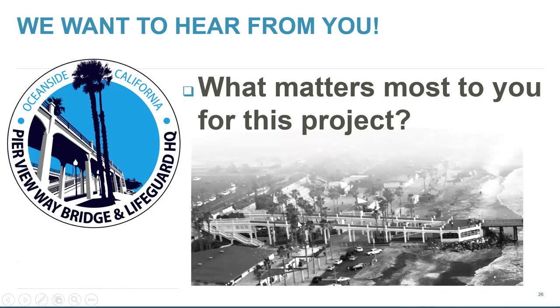So that's why this project is moving forward, not only because it has more of a sense of urgency because of its condition, but also because some of the columns and foundations that are going into the structure could be significantly larger than we anticipated. For us to do the work currently or even the year after the other project, there would be a lot of damage to any future improvements to their projects. With this one, we address a more urgent but also more timely concern.